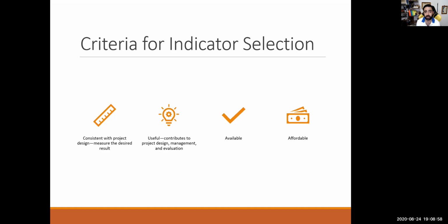Monitoring has a method. There are a lot of different methods and tables in monitoring. Let's say, for example, the logical framework, which is bigger, the results framework, which is smaller than the LFA, and the theory of change, TOC, also smaller than that. So this will help you gather the information that we talk about. But in the main theme, it is your main plan for checking the output, the outcome, or the impact. And mainly the impact is always dealing with evaluation, not monitoring.